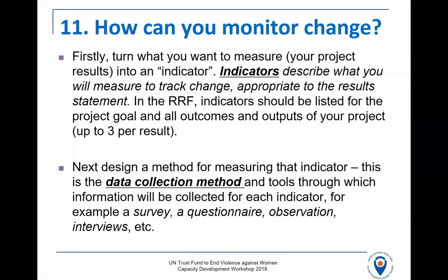I recommend you think about the indicators and data collection methods together. Sometimes people will devise an excellent indicator and find that they don't have a suitable method. So think of these together. Also, some data collection methods can be very expensive, so you will want to be thinking about this together. Don't just devise an indicator and then forget to think about the method until later.